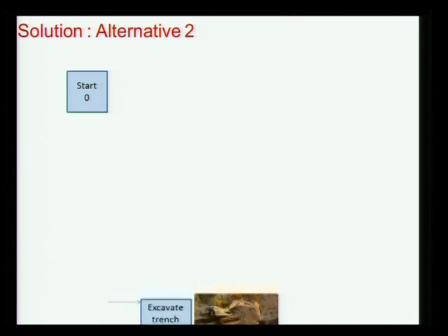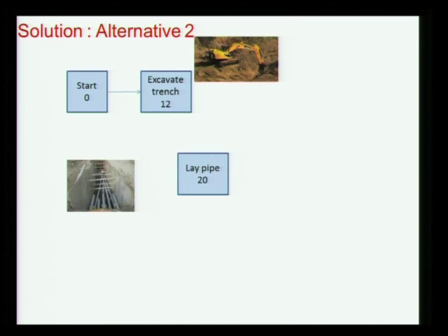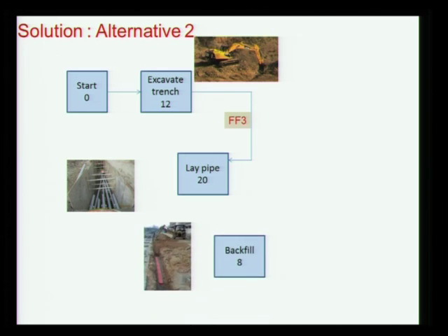Okay, so you get into alternative 2. You will excavate trench, you will say look, laying pipe can be completed only after 3 days after excavation. You will say that backfilling can be finished only after 2 days of laying pipe, and then you will go with finish. Will this solve the problem? Why? Can you quickly just draw this representation and see what problem it will create?